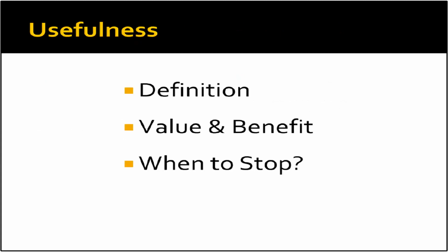Any good project will not only define what the outcome measures are and how they will be tracked, but will also define how long it makes sense to continue the tracking. After the time period is completed, a new evaluation can be made to determine if it is indeed necessary to continue the tracking. If the decision at this point in time is to continue again, a defined time period should be determined. Much extra work could be reduced if we only track things that are considered to be useful.